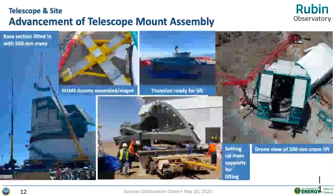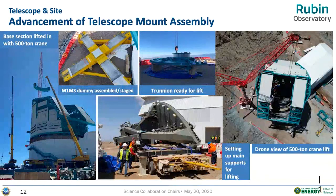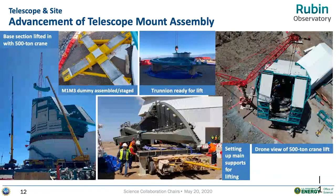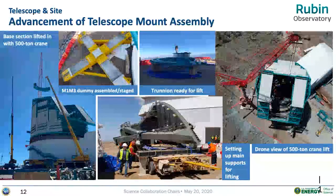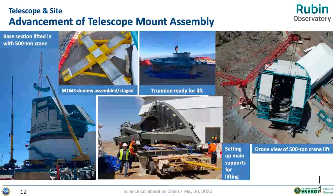More pictures of the TMA being installed into the dome facility. One thing we accomplished prior to COVID was completing all heavy lift operations. That massive crane has now been disassembled and relocated for another contract. When we resume, we won't need that scale of crane anymore, though we'll need some new cranes on site. The big heavy lifting for the TMA installation has been completed — that's a good milestone.